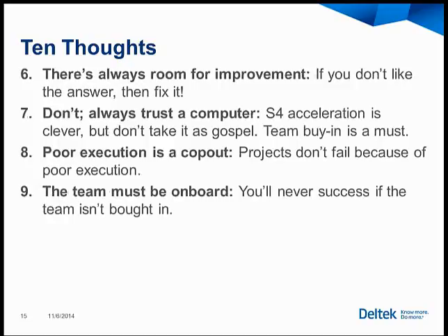We look at successful projects, and we talked about this on our S2 webcast, we don't see the habits back in their baseline that manifested themselves through the poorly executed projects. In other words, it would be easy to say, hey, this project was poorly executed, there were the problems right there in the baseline. Because then we could also end up in a situation where we said, here's a well-executed project, oh, we found those same problems in the baseline. No, actually we go in and we didn't find those problems in the baseline of the well-executed projects, which is the proof to us, and maybe also to you, that the quality counts.